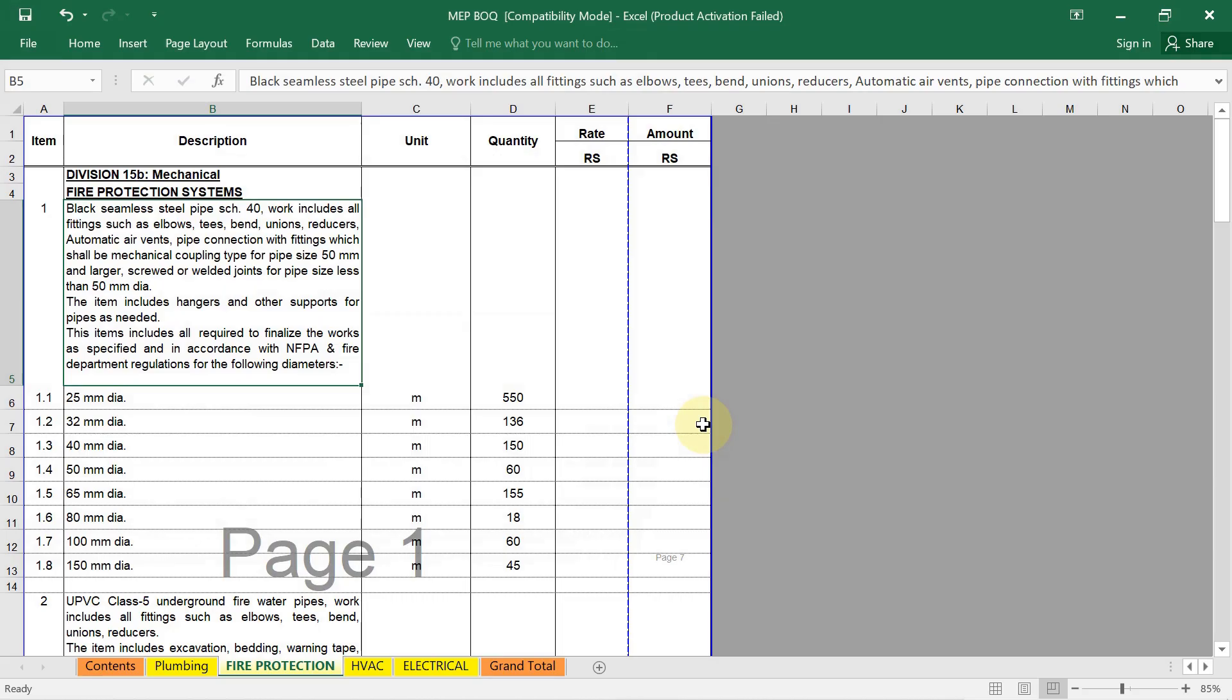Same here also, you have to follow the same steps. First step, we have to understand the project scope. Then you have to break down the firefighting work as a category wise. Then list all the components and activities like pipes, fittings, sprinklers, hydrants, valves, fire alarm devices, testing and commissioning.